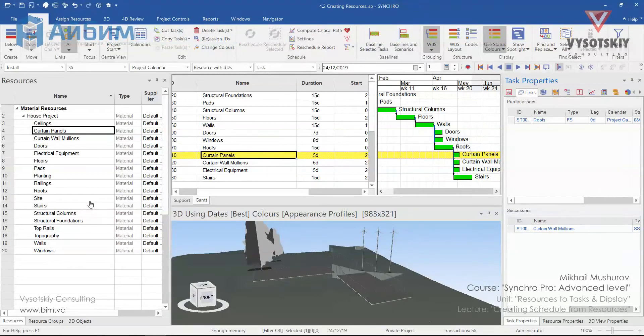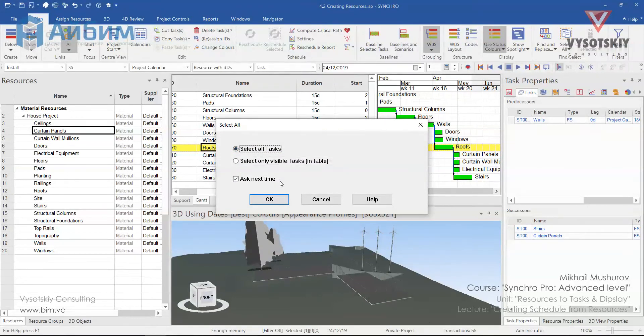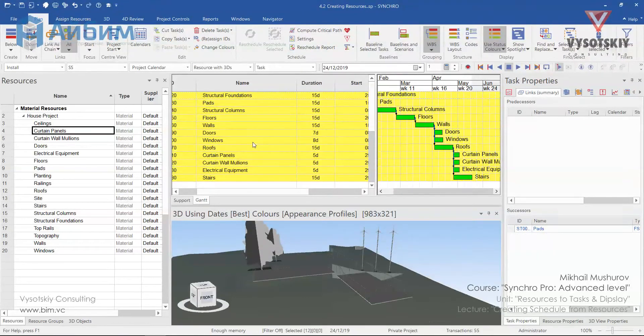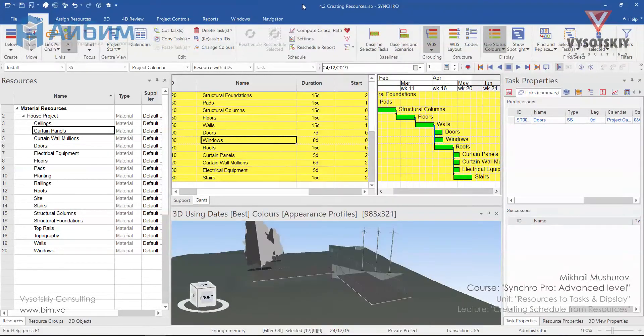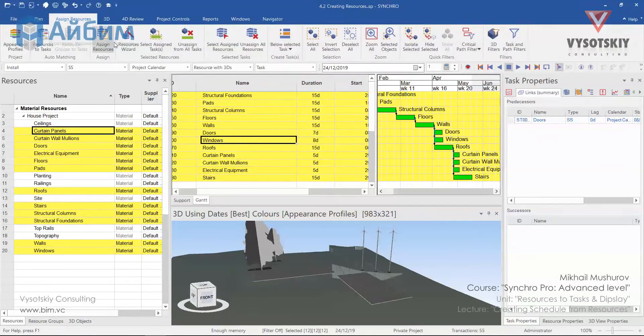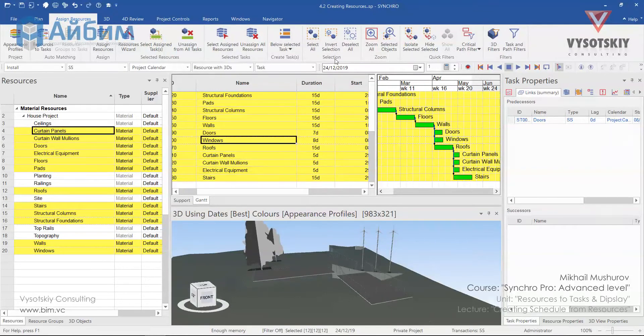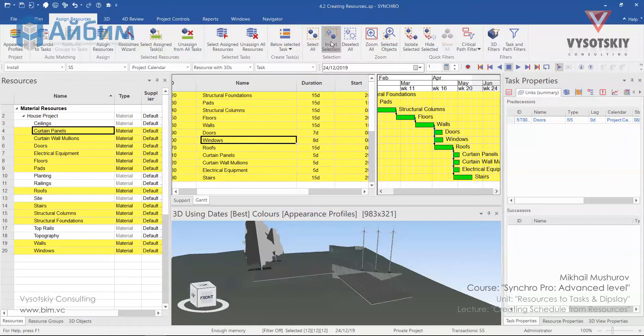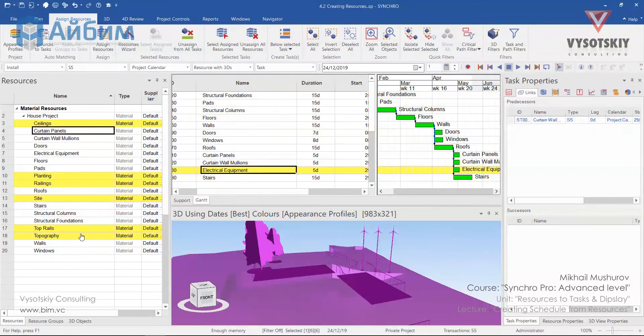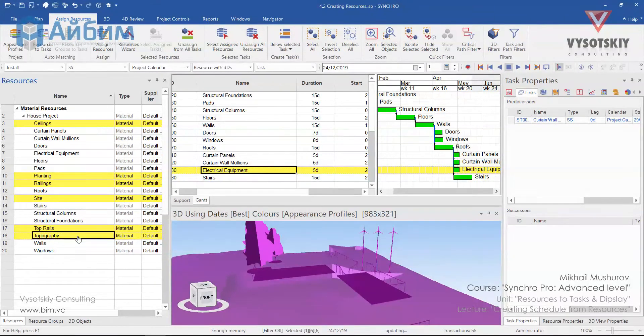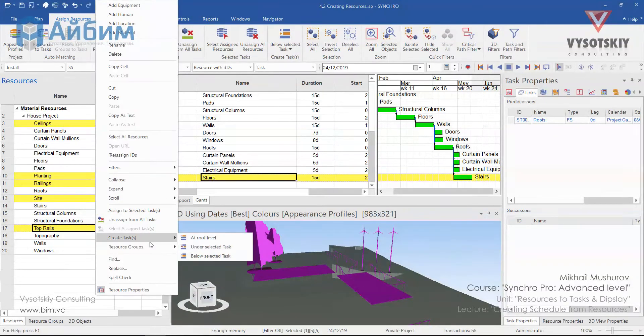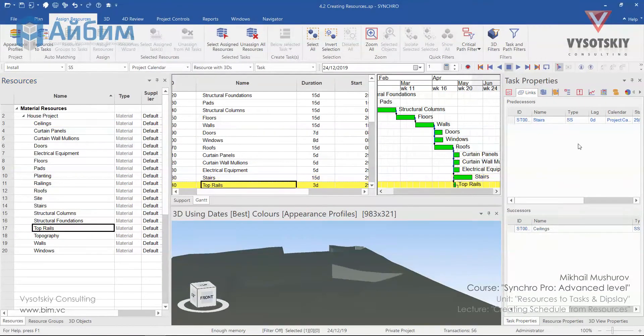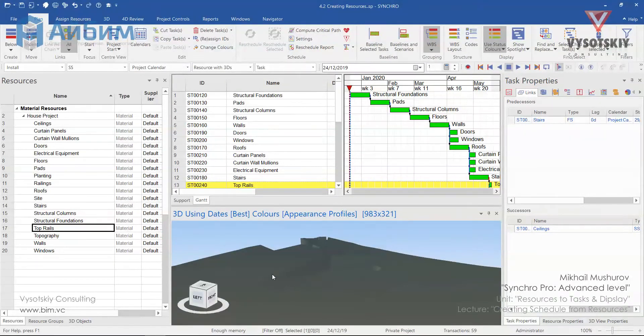In order to see what resources left unassigned, we can select all activities by pressing Ctrl A. Then we can make a right click and select assigned resources. Go to the assign resources and select invert selection under selection tab. This resource is left unassigned. We are not interested to assign topography to any task, but the rest of resources will assign below stage activity.